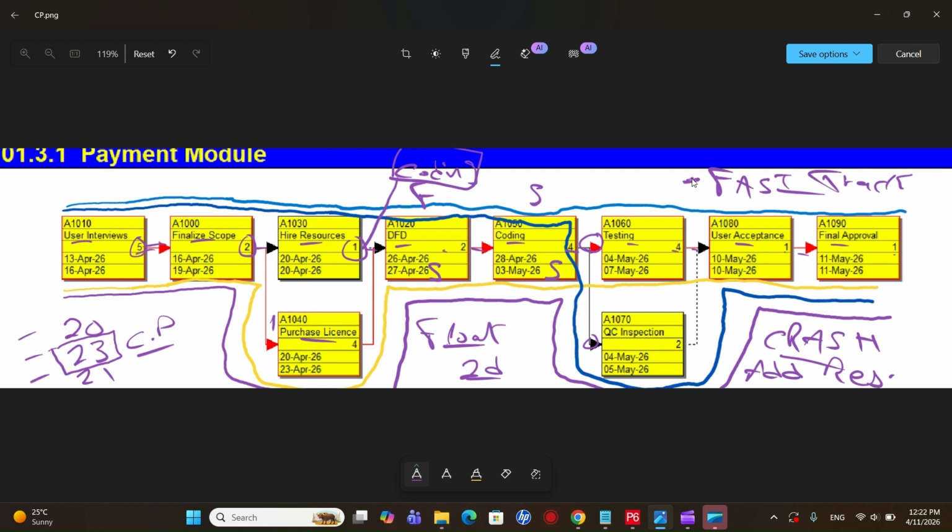And again, whatever change you make in your plan durations or in the critical path, you will have to check the float again. Float needs to be checked during the execution as well, that we will see once we start the execution of our project. And you will have to keep an eye on the critical path. Any change in the duration while you are still in the planning phase, the critical path may change. Okay, so that is the critical path.